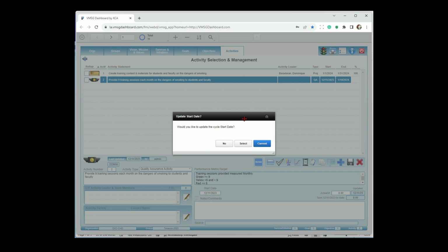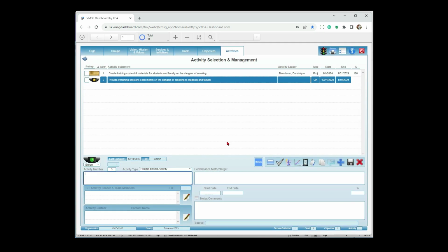Now think about that. If I just go in once a month and enter it at the end of the month, I'm going to say, yeah, I want to update my cycle start date to the next month. So in this case, we're sitting at December 11th. I want to maybe update it to January 1st, let's say. I don't want to use current in this case because it's going to set it back to the 11th here. So I could say select and I can put in, it'll automatically go to January 1st, but you can put in any starting date that you want, or I can say, no, I'm going to leave it here. The reason you might say no is because I'm still going to enter data this month. I'm not done for the month here. We'll go ahead and say no. So now it basically saves that activity here.